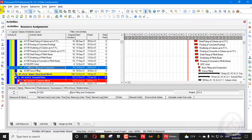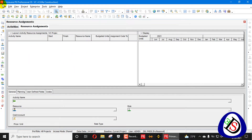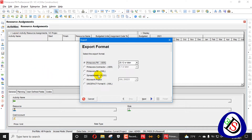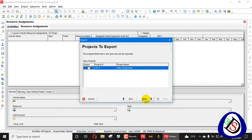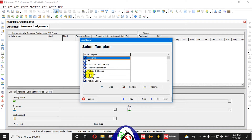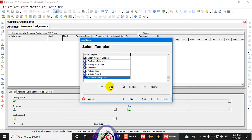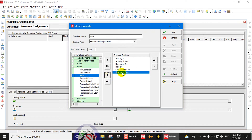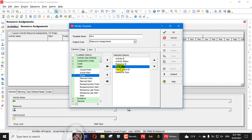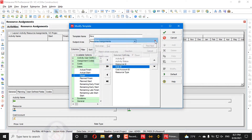In Resource Assignment, I have deleted that resource — there are now zero resource assignments. I will export this program in XLS format, press Next, and choose Resource Assignment as the last option. I will check the export checkbox for the villa construction project. I need to select a template; I have already created a resource assignment template. The required columns are Role ID, Activity ID, and Budgeted Units.